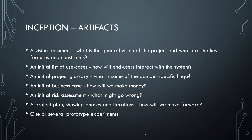In UP you explicitly deliver outcomes of a phase — these are also called artifacts. Here's an overview of the expected artifacts for the inception phase. Realize that these documents are on a relatively high level. The vision document describes the whole project from a bird's eye point of view. A list of use cases describes how the end users interact with the system — for example, students should be able to submit assignments and see their grades, while teachers and teaching assistants should be able to view, distribute, and grade them. Other artifacts include a project glossary, a business case, a risk assessment, a rough plan, and perhaps some prototypes to test technology or ideas for the user interface.